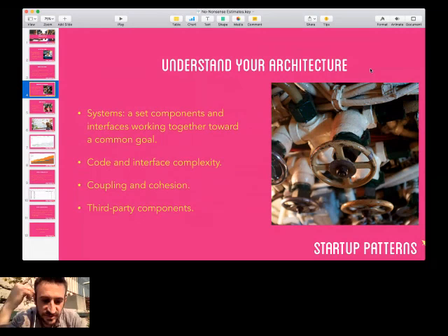But you just covered this architecture thing. Once you really understand your overall architecture, keep in mind that there are also benefits and costs to leveraging third-party systems and components. That's sort of an unavoidable thing in today's world. You don't want to have to build everything from scratch. You might have payment systems, storage systems, all kinds of other systems that are pieces of your overall network. Those third-party components represent a risk and can be unpredictable as well. So you have to include all of that in your understanding of the work required to build such and such a feature.